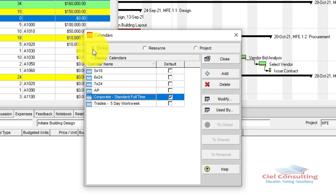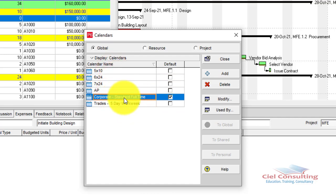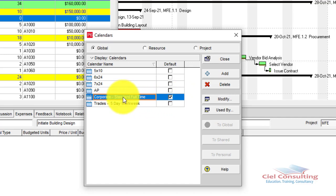Going back to the Global Calendar category, there are some default calendars that come with Primavera P6. In my case, the Corporate Standard Full-Time Calendar is the default. This means any project I create in P6 will use that calendar unless I change it. The Corporate Standard Full-Time Calendar is a five-day workweek, with work from 8 a.m. to 4 p.m., Monday to Friday.